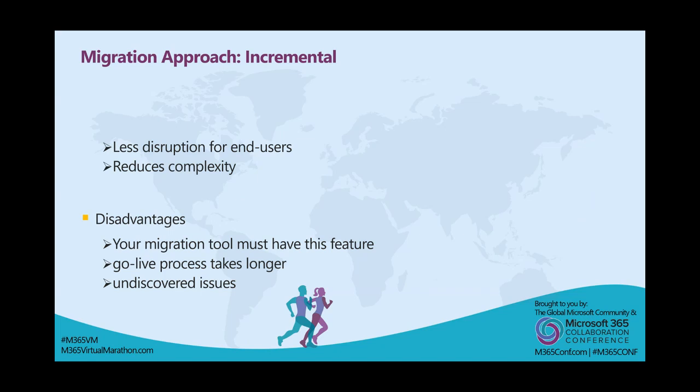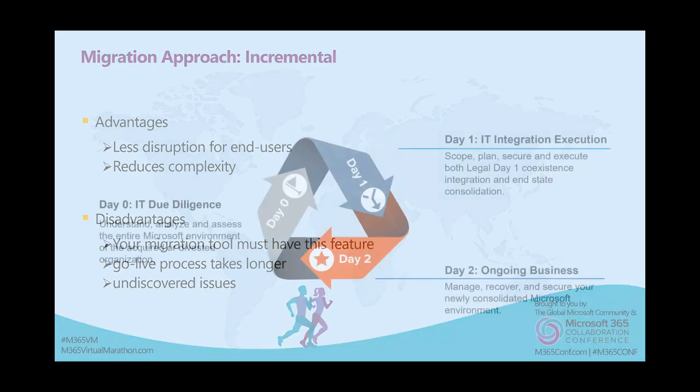No, they definitely want to continue on the source environment, but the migration has already started, so you have to sync and do an incremental migration on the source and target, because both environments are currently in use. And then you definitely need tools, because this kind of scenario is completely impossible without a migration tool.